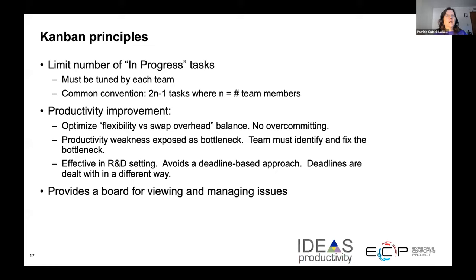There are basic principles you should follow for Kanban. An important principle is to limit the number of tasks currently being worked on — this limits the cost of context switching for team members. Each team needs to determine the number of tasks that can be active; a good rule is two times the number of team members minus one. Kanban is good at exposing bottlenecks. If a column like 'waiting for review' is full, you can easily see the bottleneck and work on fixing the processes that affect it. Kanban avoids a deadline approach more common in Scrum and is a nice way to manage tasks, view progress, and improve productivity.